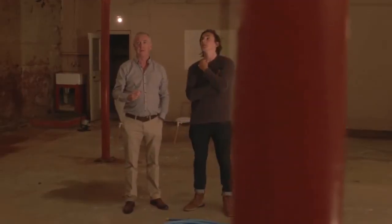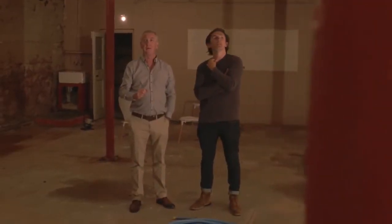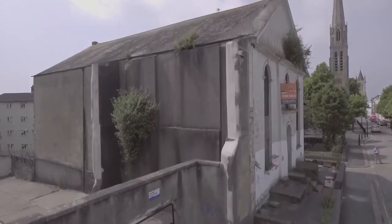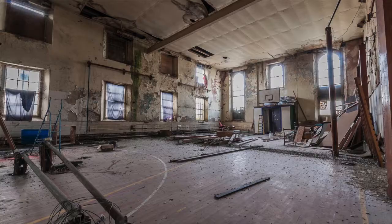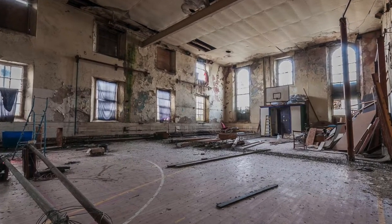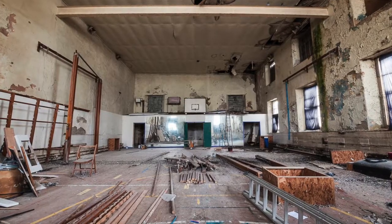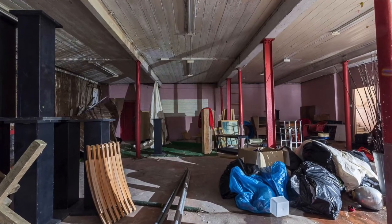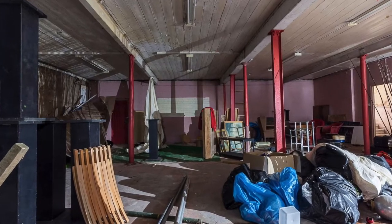We went through fairly protracted negotiations with the owners, as it had been on the market for a while. The owners had fairly strong ideas of what they wanted done with the building. We were also going through discussions with the neighbouring landowners in terms of where we could have access and where we could drive new windows into the side of the building, which would then overlook their site. So we didn't actually get to legals until September 2017. That's over a year from when we first viewed it that we actually managed to get to final heads of terms and get into legals.